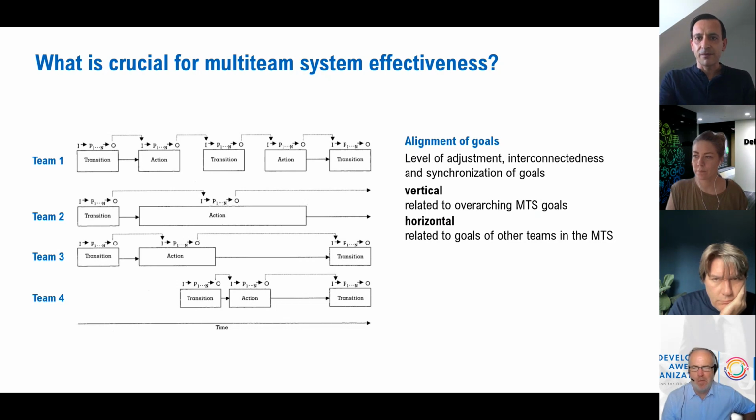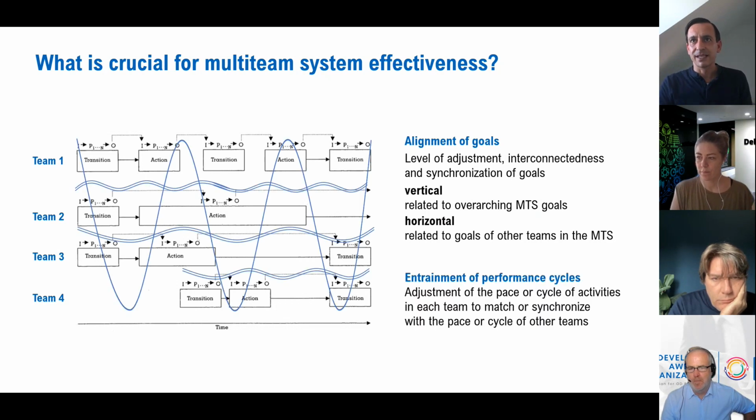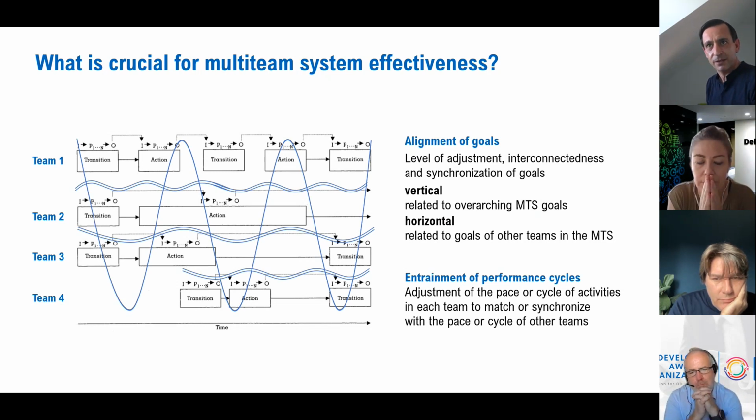And the second concept I would like to introduce to you is the entrainment of performance cycles. As I already said, what is it about? The adjustment of the pace or the cycle of activities in each team to match or synchronize with the pace or the cycle of other teams.